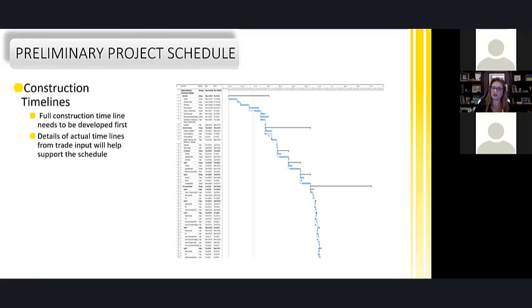It's a little trickier because with concrete, everybody has a good feel for how much time it takes to do a floor. They understand all the reshoring, which is some kind of post thing, and how long that takes. So from that, we go to the trades and have a discussion about how much time all of this takes from your perspective in real time. If you had everything exactly the way it needed to be, what does that look like? And then we start building a real schedule around that which isn't held by concrete timelines, because concrete tends to be quite a bit slower for us.